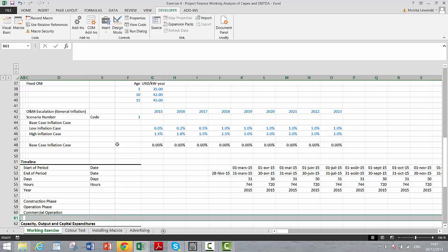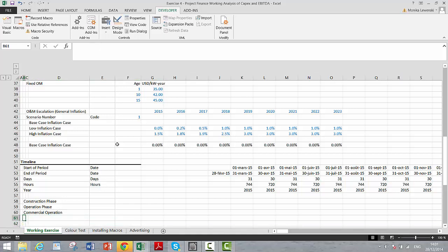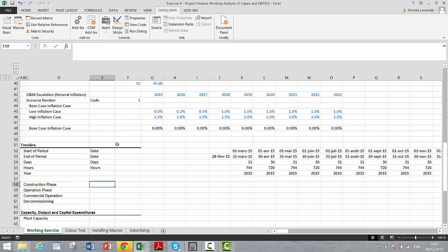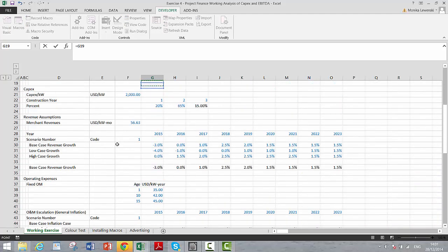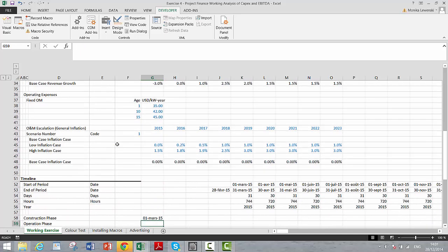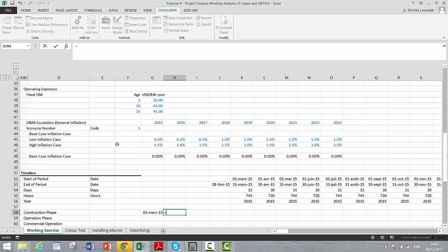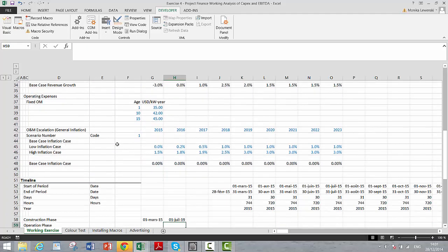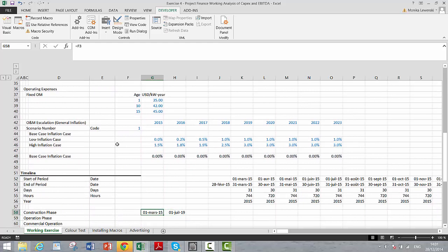Okay, and we might also want to know the decommissioning. So let's put a series of inputs in here, and for these, I think a pretty good way to do it is to put the start date of the construction and the end date. The start date means we begin construction in this month. The end date means we finished just before this month.